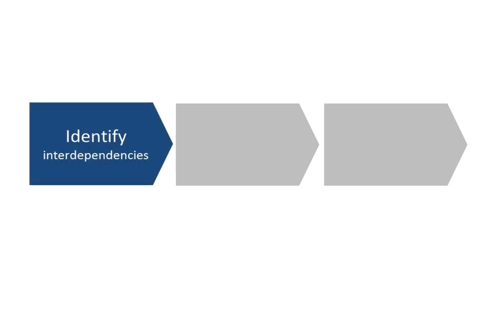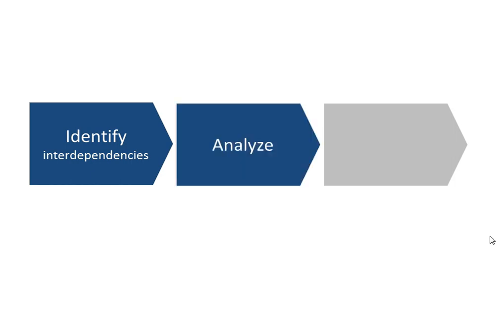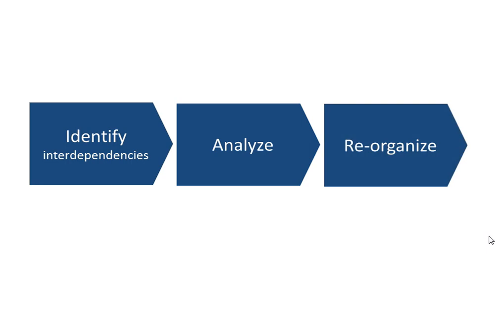In practice, you will usually proceed in three steps to do this. First, you need to identify the interdependencies, of course. If it's a small group of people, you can simply invite them to a workshop where you can interview each one of them individually and ask them about their key responsibilities and who they depend on for information or approval in order to complete their work. For larger groups of people, I have developed a survey questionnaire that can be sent out electronically, and that can be used to map even a fairly large organization in less than a week's time. Once you have these data, you can start to analyze them by using the DSM methodology, and you can then adjust the organization based on the results of your analysis.